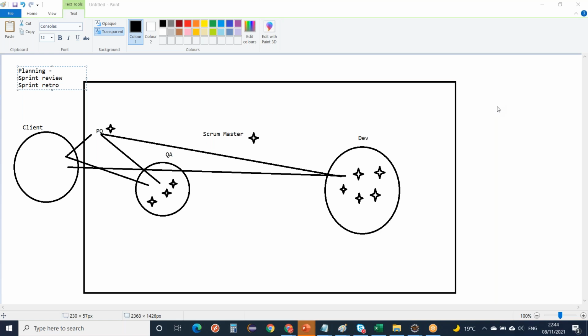It will be done at the beginning of each sprint. Each sprint beginning you will be having the sprint planning. You will plan the activities for that sprint, obviously, right? So in each iteration you have to plan something new, so each time we need to have this sprint planning meeting. It will be just for 1 hour to 2 hours. It depends, generally. As per the standard, 2 to 4 hours of time is given for a sprint planning.